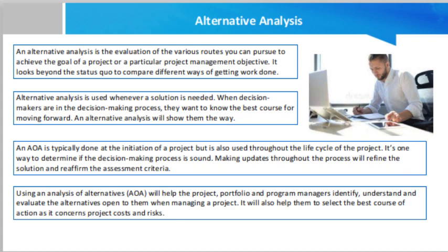Assess the alternatives. Look over each of the alternatives you have come up with. Evaluate them against your established criteria such as cost, risk, life cycle cost, effectiveness, benefits, and likelihood analysis. You will also need to conduct a sensitivity analysis, which is a financial model that looks at a target variable and how it is impacted by changes in input variables.